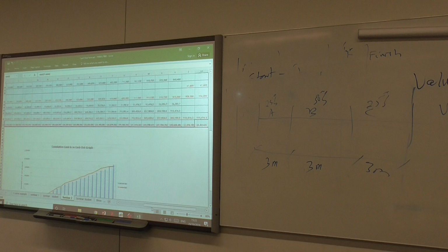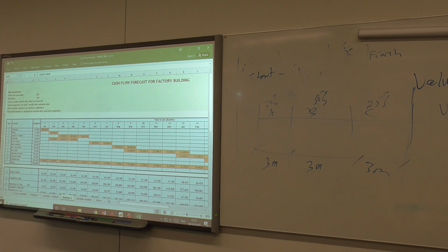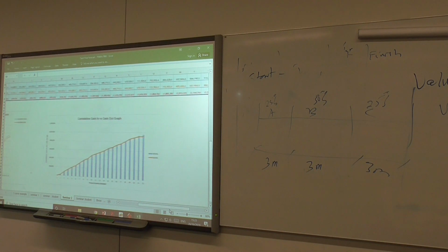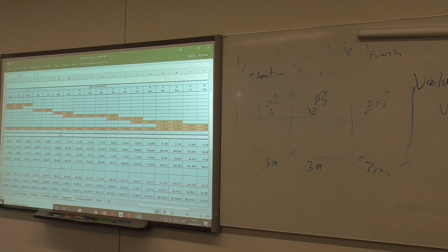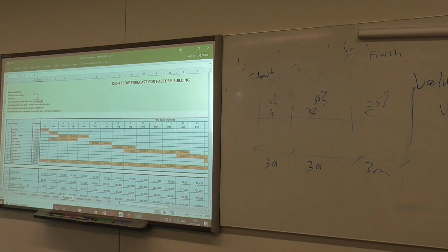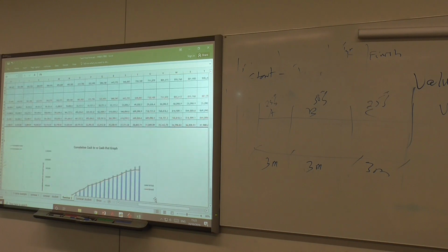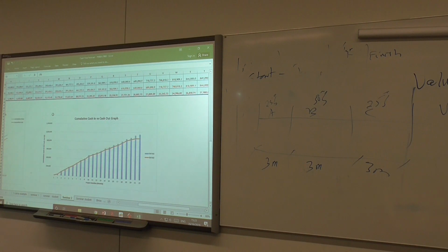So you need to be able to really negotiate what you have there. And you can do what-if analysis by trying to play around with the retention figure. For instance, if the retention was just 5%, it brings it quite closer. And then if the profit value of the contractor was also increased to maybe 10%, big money. Wow. All it means is that the contractor doesn't really finance; at every point in time, whatever the contractor is paid is more than the actual cost.